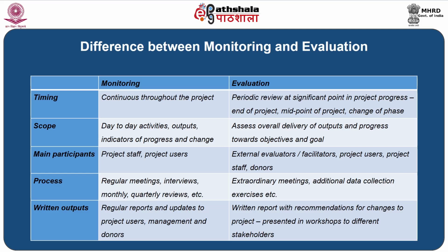Based on the scope, monitoring is conducted as a day-to-day activity and the outputs and indicators of the progress and change are measured. If we look at evaluation, it assesses the overall delivery of the outputs and progress towards objectives and goals. The main participants in monitoring are project staff and project users. However, in evaluation, the main participants are external evaluators and facilitators, project users, project staff, donors, etc.